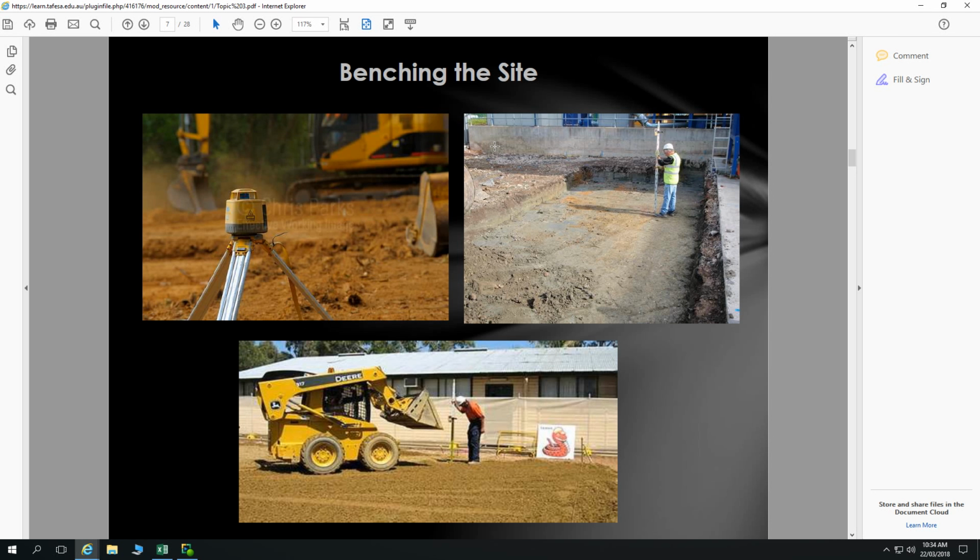We also may have soil conditions which are problematic in certain weather conditions. And we have to think about that. On a site we've got at Second Valley, the top of the soil there, when it gets wet, is really compressive. So we went to bring a truck that carried 10 tonnes on the back of it. So we're talking about 15 tonne of machinery. It can only get so far on the allotment before everything started sinking and compressing in. That's going to be an issue.